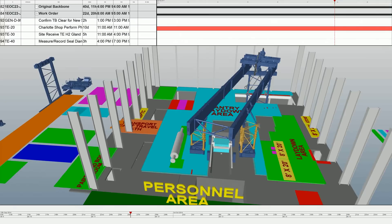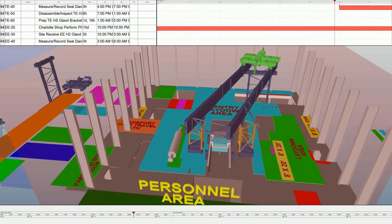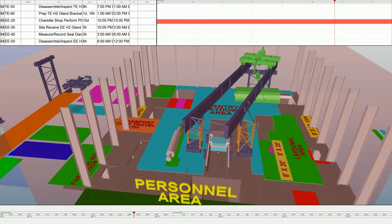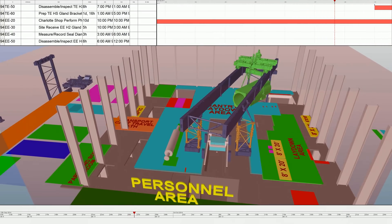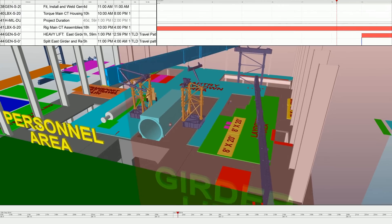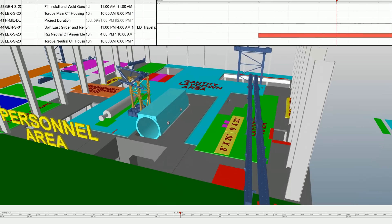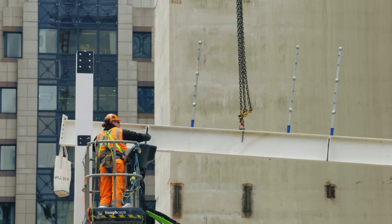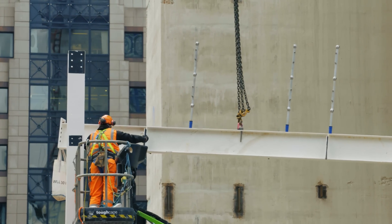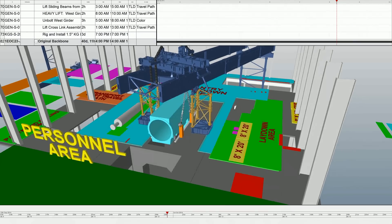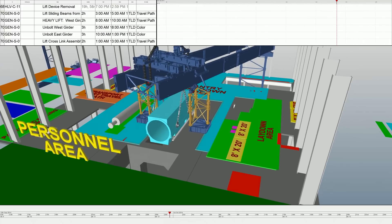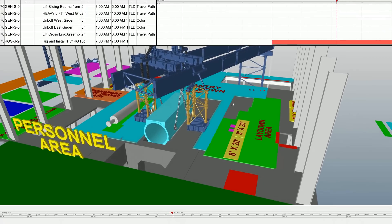Visualization and simulation provided so much better communication about safety and risk. The team went from 10 dropped objects to none, recordable injuries to none, and one near-miss to none. The most expensive decision you can make on a complicated project is a decision to not use 4D.